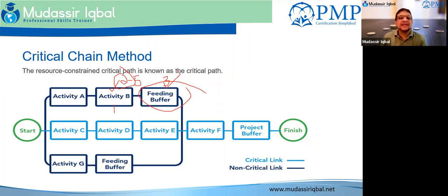So this is where the critical chain method helps you identify what you could do and what you could not do. It works on theory of constraints. It focuses on resource availability and dealing with uncertainties and changes. So this buffer, a contingency reserve, and the total float are not the same. This buffer, also called a contingency reserve, is not equal to the padding that you set of 2 to 5 days.